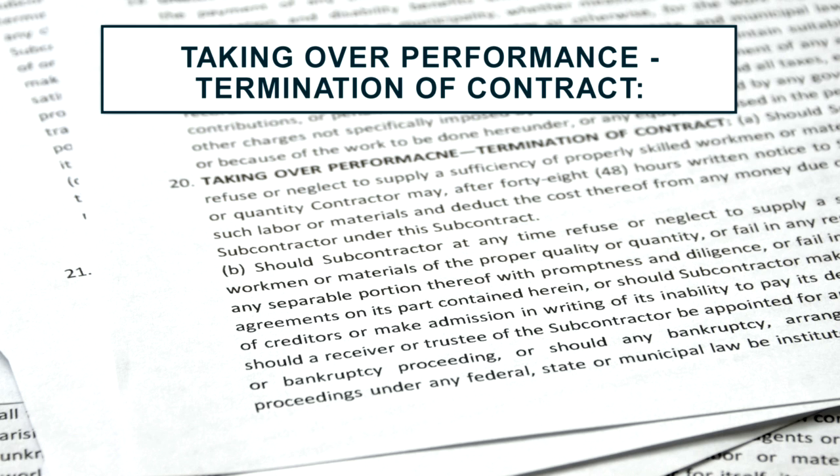Basically what this is doing is someone's going to take over your work, and any costs related to doing that work are going to be charged against your account. You will not get any payments until all the work is properly done. And that very well could mean that you won't get any payments at all. In fact, you may be sued for additional costs that the contractor suffered. So be aware of that. It's an unfortunate situation, but it does happen in our industry that contractors terminate subcontractors.